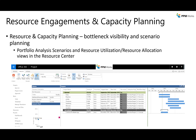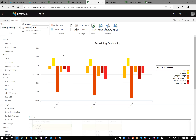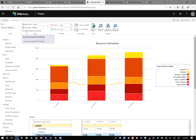In the resource analysis view, below the dark line are projects that fell off because we didn't have enough resource capacity. Above the line shows what we can actually do with available resources. In the resource utilization view, you're looking at a stacked bar chart for one quarter — you can change the time scale. I want to point out the 'Include Proposed Bookings' checkbox, which is important for understanding soft versus hard bookings.